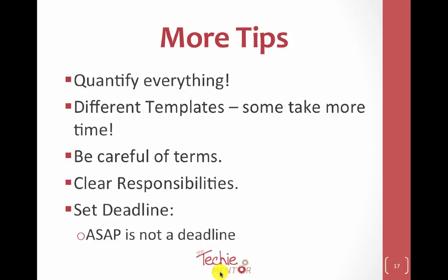Quantify everything. Remember, different templates will take different amounts of time. Sales page is going to take more than an opt-in page. Be careful of terms. In other words, you may have to explain things to clients because they don't understand the terminology, which is perfectly acceptable. I mean, that's how it is. Make sure that responsibilities are clear. If the client is providing you the video or the copy, make sure that's clear. Make sure there's a deadline as to when they get you the information you need so you can create the lead page, right?